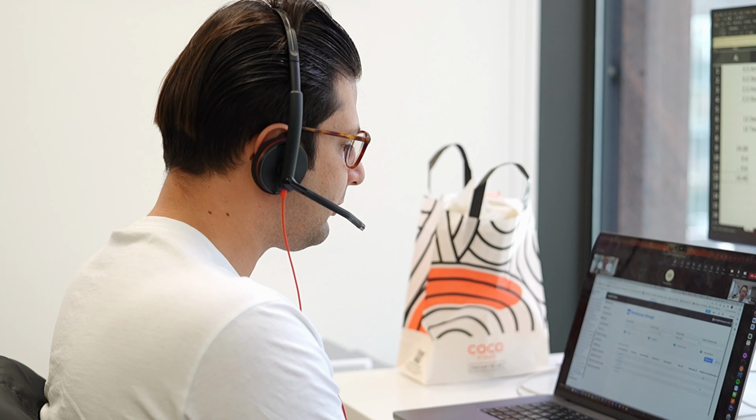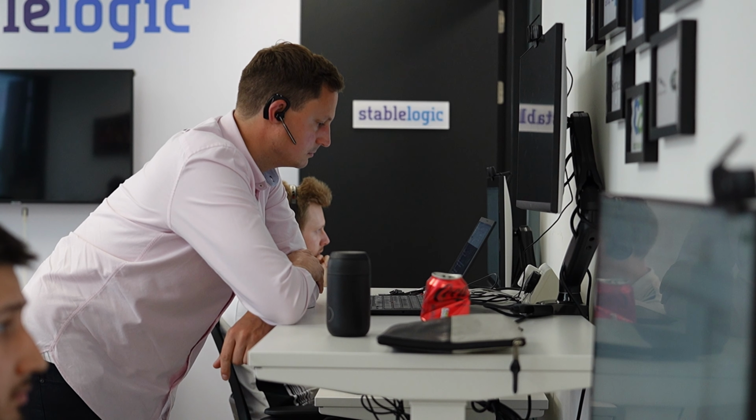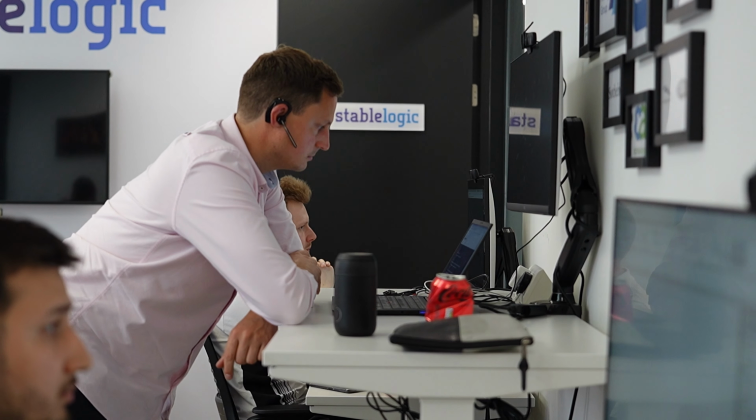Once we have conducted the evaluation of the RFP responses, we will then shortlist the vendors and invite them to a demonstration day. Here they will come to your client's site and present their proposal to your business. Once this is complete, we then may conduct further shortlisting and enter a negotiation stage with the shortlisted vendors. Following the negotiation stage, we then select a preferred vendor and then commence the contracting.